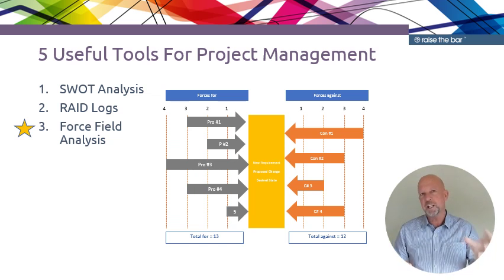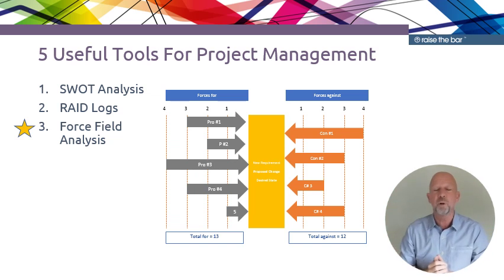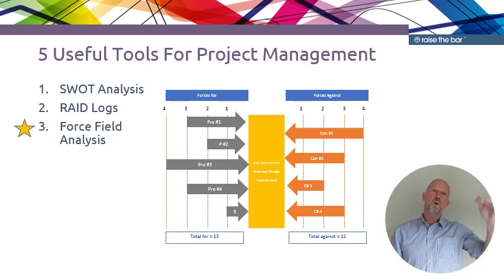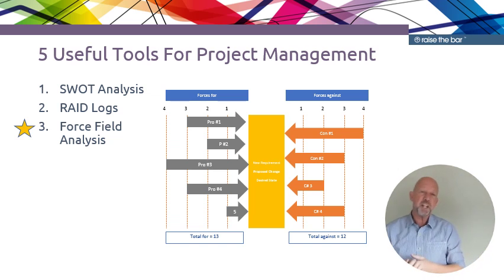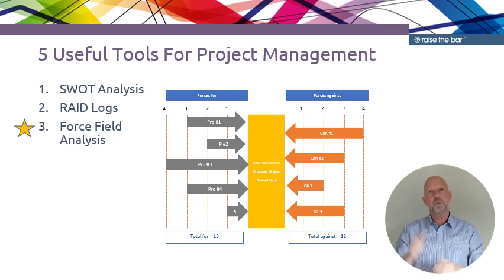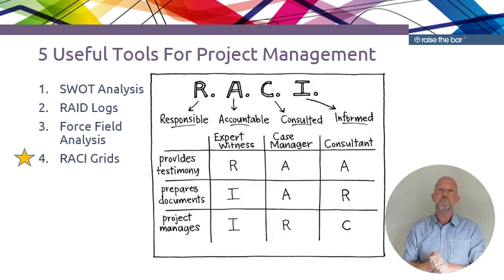So they might have a slight hiccup in trying to introduce this in a particular department, but we know that the for has a higher quantifiable or measurable value to it. So we go through all of our fors, give them measures, we go through all of our againsts, give those measures too, then add them up at the bottom and work out really, can we put a case together to say this project is going to be successful, or actually when we've weighed up the pros and cons, I don't think we're going to struggle to get this through, so we need to analyse that. So that's what the force field analysis does, weighs up the pros and cons and gives them some measurables.